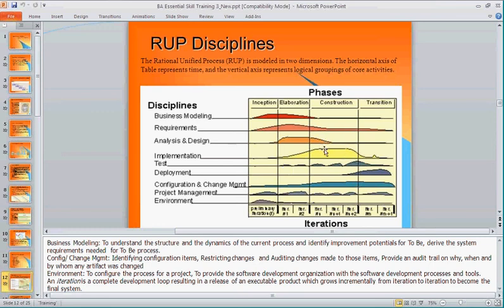Prime activity, development. They develop, right? One round iteration, development. Then we test that round. They do the unit test, SQA does their testing. SQA comes back and says, wait a minute, nope, we haven't reached our QA standards yet. What is not working? Does it need to be fixed, or do the requirements need to be revised? If the requirements are fine, the design is fine, it's just the code that needs to be developed, then you go into another iteration of development, right?